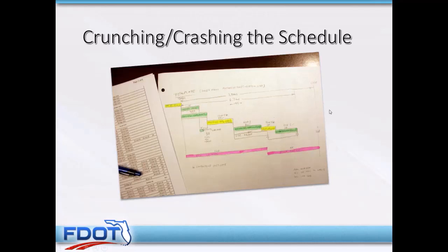So in order to move in, the letting is way over here. In order to move all this in, here's a 268 date. We reduced the yellow bars, we compressed it in, but then, just like before, we have this other parallel activity, and this is the reevaluation for PD&E. We realized that we can do all the compressing here we want, but we can't compress the overall schedule without making sure this bar is reduced too.